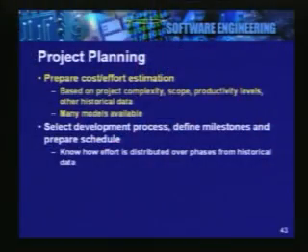We will naturally benefit from the previous experiences. So we should clearly keep a record of other projects performed by us, understand our productivity levels, and then estimate the effort or the cost for the new projects we are undertaking. There are different models available for cost and effort estimation, and in this course later on you will learn more about these models. Once we have done the effort estimation, then we select the right development process.